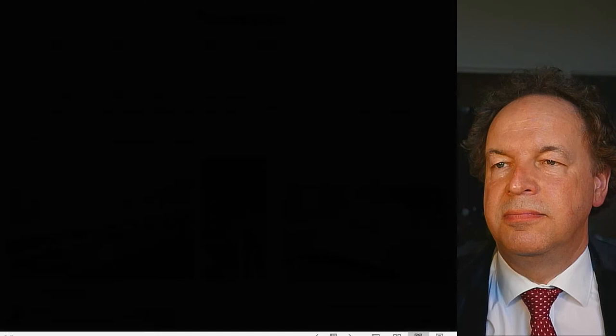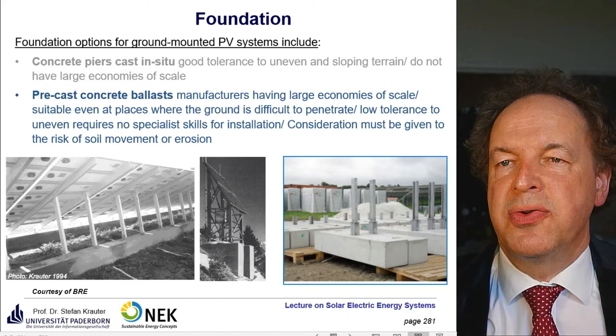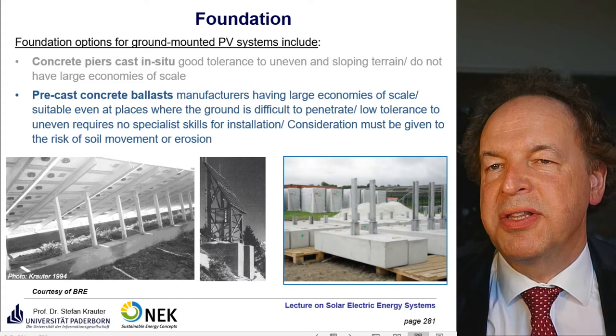Here you see also precast ballasts on the right side. So you transport the whole ballast there, and so this saves you some money and costs on site. This is how the pyramids have been made. So they made the blocks not on site. They made the blocks relatively far away and transported them to the installation site.